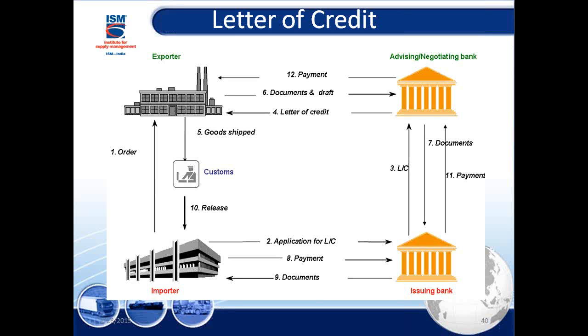Now the letter of credit by default is irrevocable. The two words you have to keep in mind: revocable, irrevocable. Irrevocable means once it's gone, it's gone. Like a shot, it is gone. You can't take it back. You can't revoke it. You can't cancel it. If you cancel, there are going to be some penalties. So keep in mind, it can't.